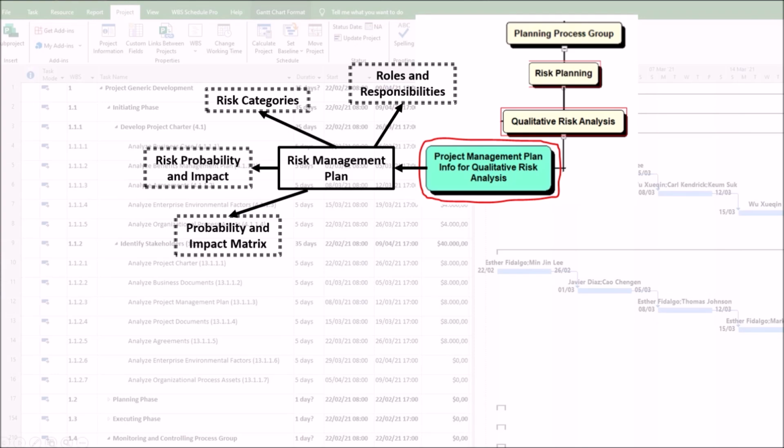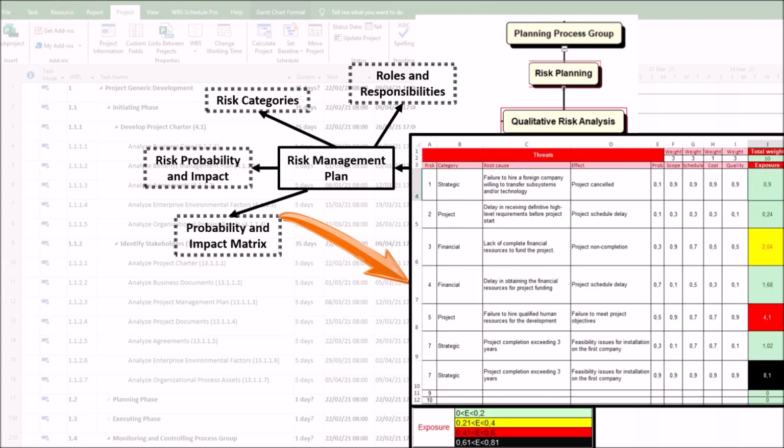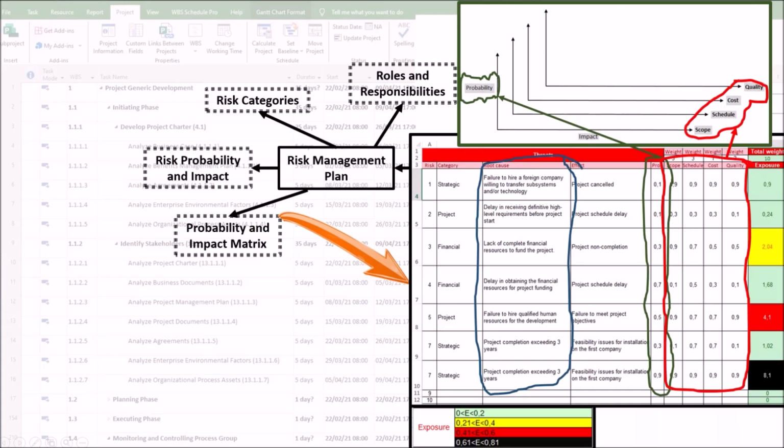The steps to construct and use the matrix are as follows. Identify risks. Brainstorm and list all potential risks to your project or objective. Define the axes. Establish clear scales for probability and impact that are tailored to your specific project or organization. Assess each risk.